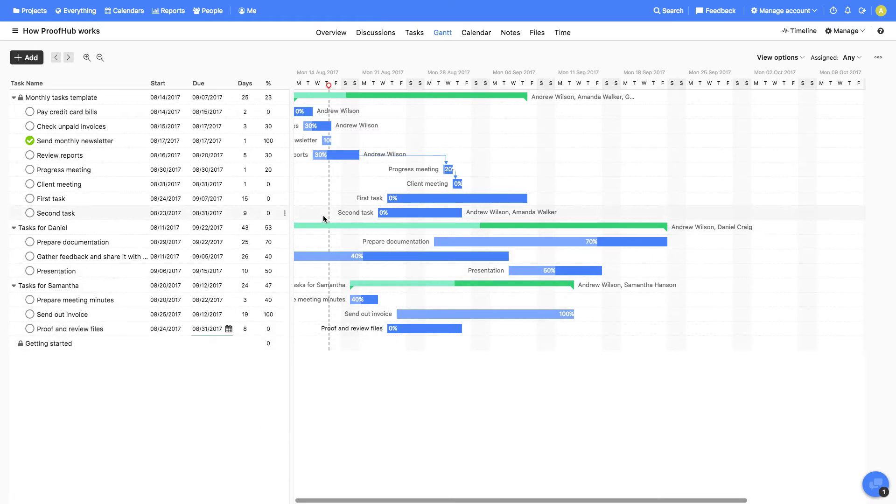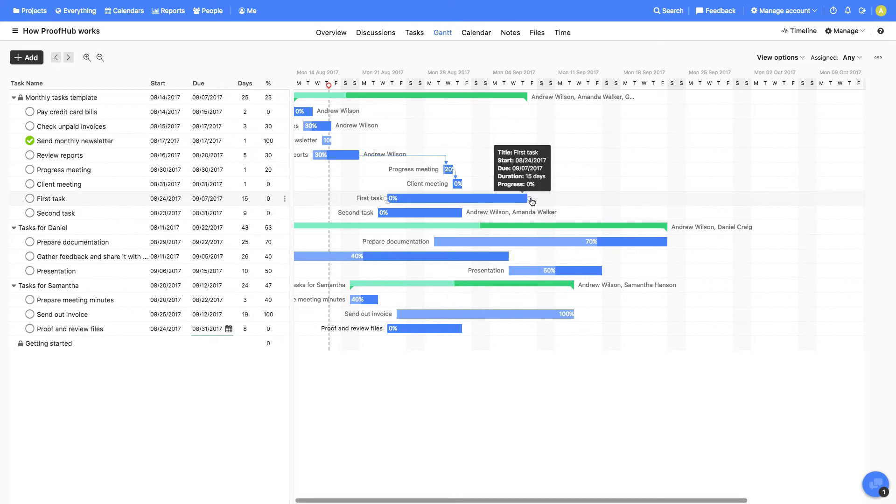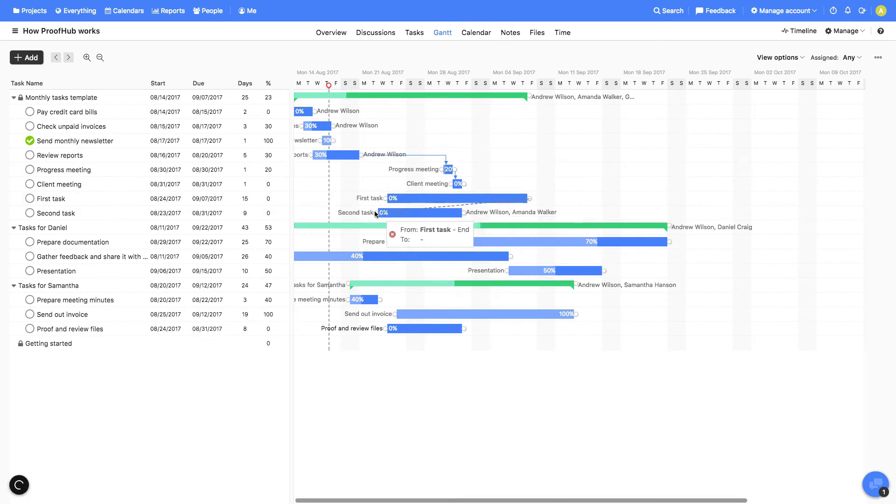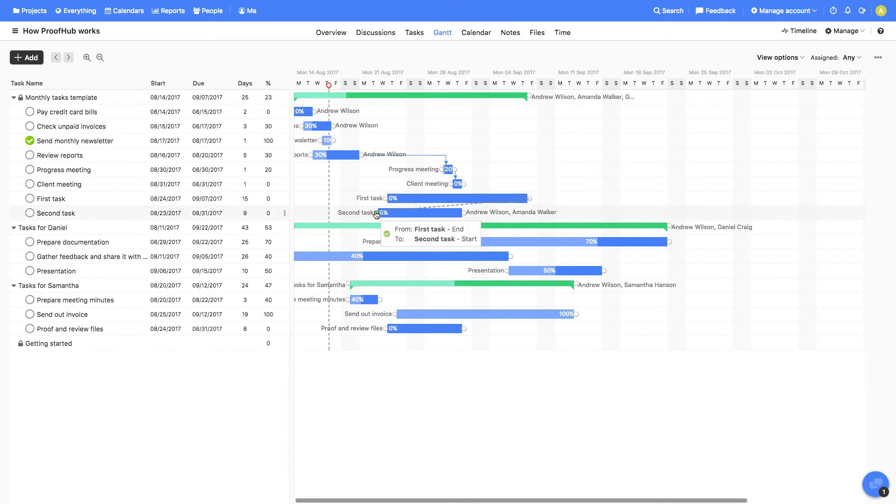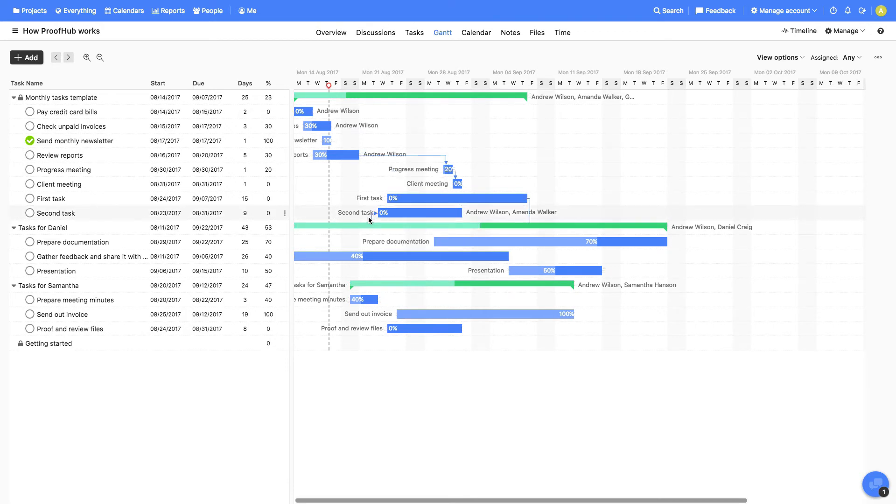Next, we'll set dependency between two tasks. Let's say we'd like the second task to begin right after the first task is completed. We'll click the circle in the end of the first task and drag it to the second task, and the dependency between these two tasks is set.